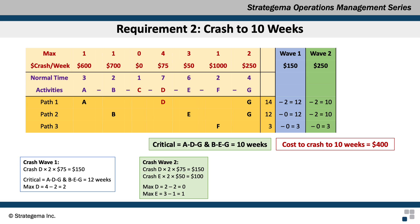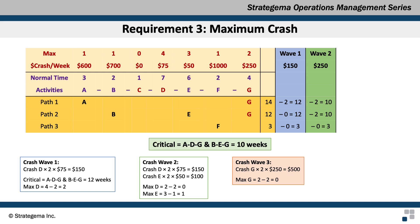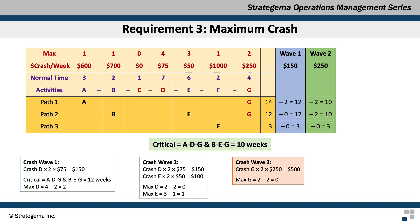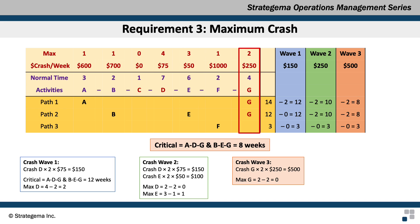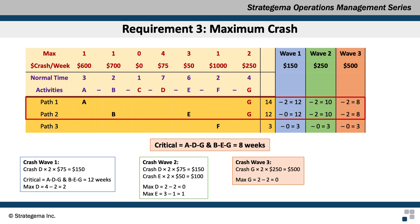Our last requirement is to crash the project as far as we can go, so we continue with the next wave. We still focus on the two critical paths and find activities common to both or crash activities on each. Activities C and D are now red and removed — D can no longer be crashed. The next least expensive activity is E, but it isn't on both paths, so we leave it for now. Activity G at $250 per week is common to both paths, so we crash it by its maximum of 2 weeks for a total cost of $500. This reduces both paths 1 and 2 to 8 weeks, and G can no longer be crashed.